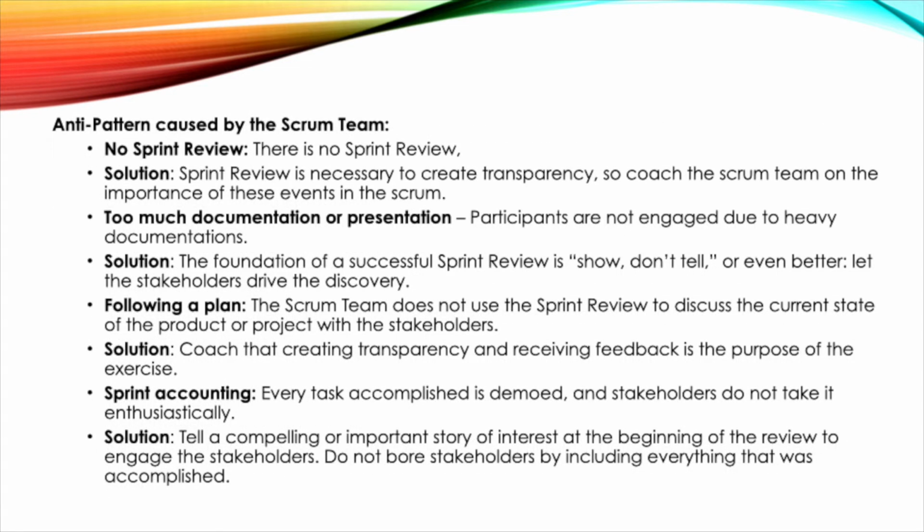Anti-pattern caused by the Scrum team. No sprint review. There is no sprint review. Solution: the sprint review is necessary to create transparency, so coach the Scrum team on the importance of these events in Scrum. Too much documentation or presentation.